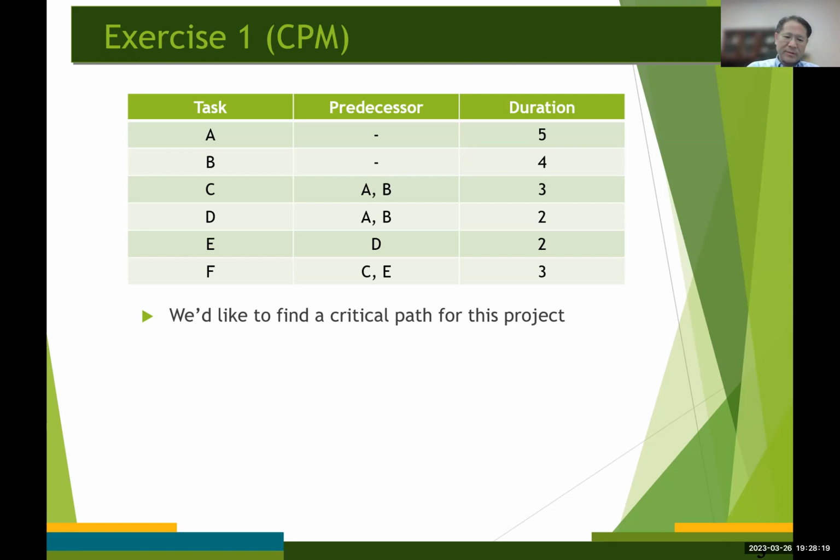Okay, so in general, usually node number 0 represents the start of the network. So let's have node 0 here. That's going to be event number 0. And an arc should lead from this node, event number 0, to each activity that has no predecessors.